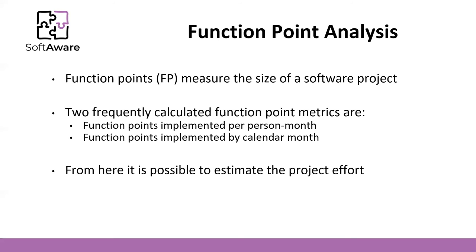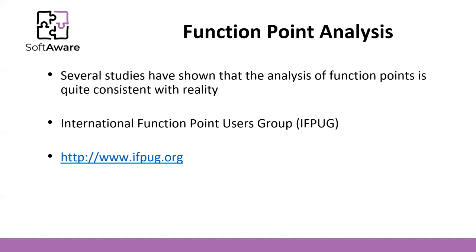Using the technical complexity factor and the unadjusted function points, we calculate the final function points. Then, using these function points, we have tables that allow us to calculate the size of the project in person-months or another time measure. Several studies have shown that function point analysis is quite consistent with reality. You can consult the tables through the International Function Points User Group, IFPUG, at their website.